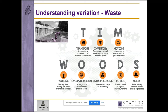Unnecessary waiting — for people or parts waiting for work to be completed or decisions to be made, such as waiting for the finance director to approve a purchase. Unnecessary overproduction — producing goods or services sooner, faster or in greater quantity than the customer demands. Unnecessary over-processing — processing beyond the standard required by the customer, often referred to as gold plating. And unnecessary defects of both process and product or service — in construction this would include early warnings to subcontractors or snaggings.